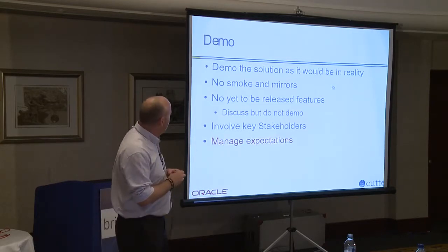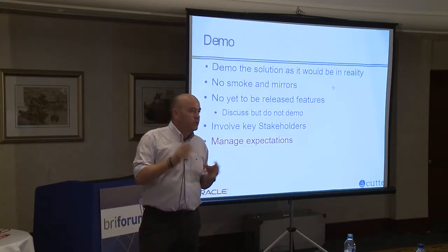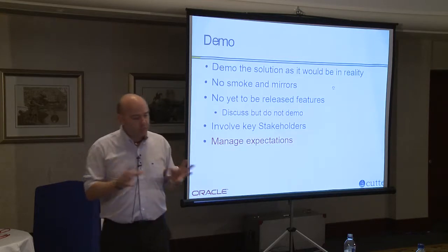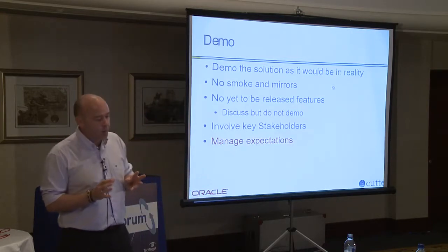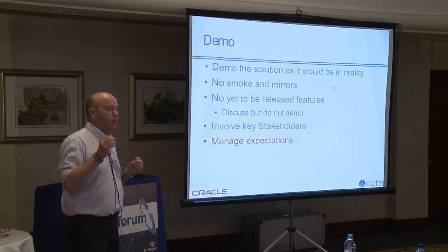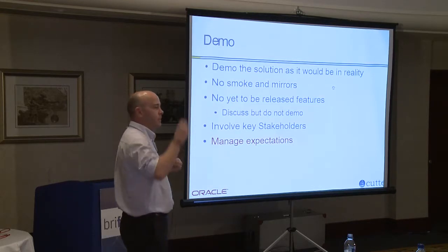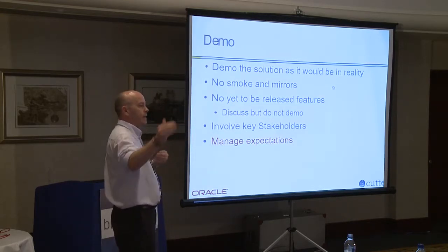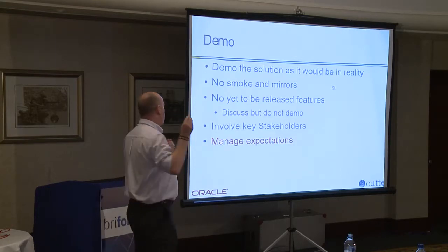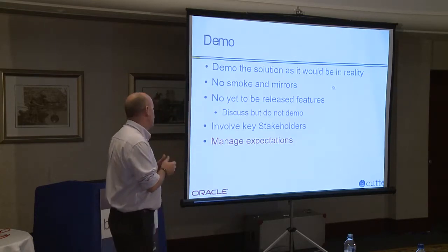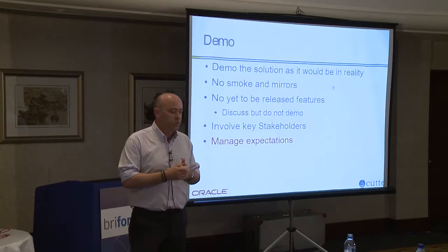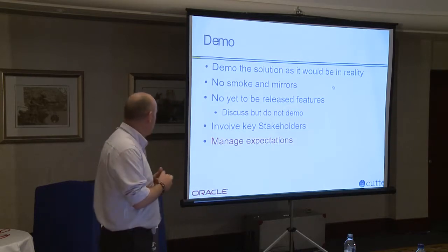Don't talk about yet-to-be-released features with a time frame and a time scale. It's something that does frustrate me a little bit with Oracle because they don't roadmap, but I understand exactly why they do it. It's so that the expectation of something down the road is not set and you don't buy on that expectation. Be careful with talking about not-released features, and the Oracle guys will back me up on that one.